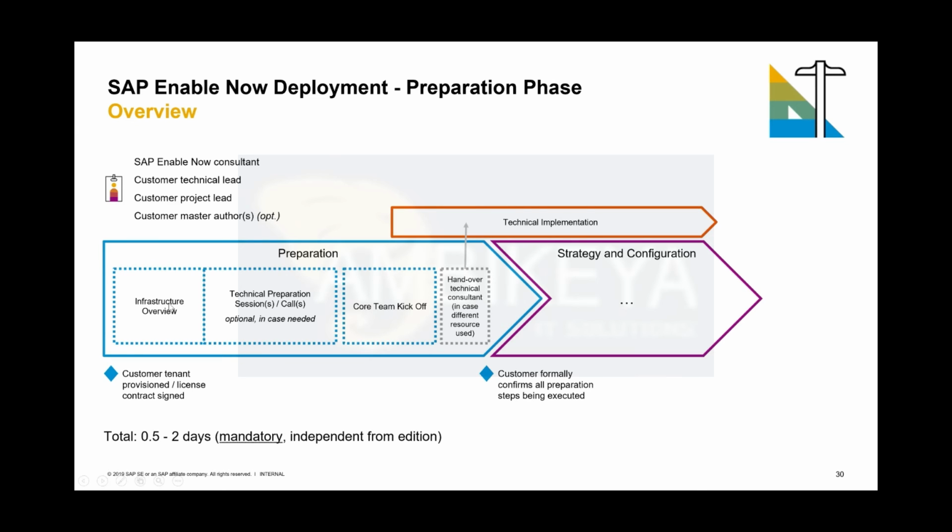And then it might happen that this bunch of people says, yes, now we got it, but we need to prepare this a bit more intensely, especially the bigger the target infrastructure becomes. For global players like the Coca-Colas and the Walmarts of the world, the database administrator could be located in the southern Philippines, while the application owner is a Canadian guy. So we need to bring those people together and really set the awareness that this needs to happen.